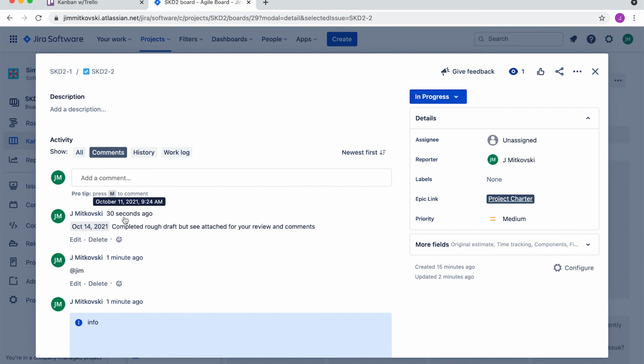So who's doing what, and then week over week track your progress, and have a team meeting. Have a daily stand up for 10 minutes a day where you all get together and share progress, make sure everyone is still following the plan and there are no issues or risks present, and you can just continue to do that work.